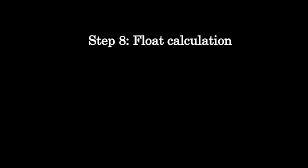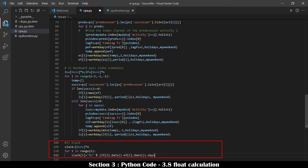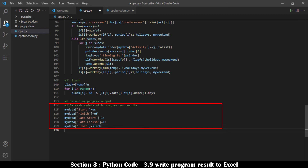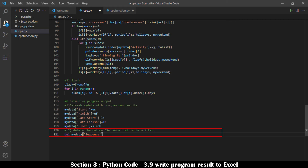Float is computed by comparing the early schedule and the late schedule of the same activity, either start date or finish date. If the late schedule date equals the early schedule date, float is zero, meaning it is not possible to delay the activity without impacting project completion. Activities with zero float are defined as critical activities. Once critical path analysis is complete, early start, early finish, late start, late finish, and float in the variable myData are replaced with program run results. The sequence column added for the ps_in_order function is deleted, and the Excel CPA worksheet is written with program output.